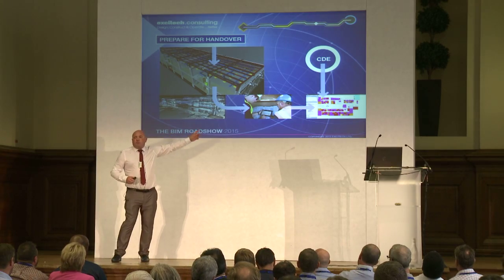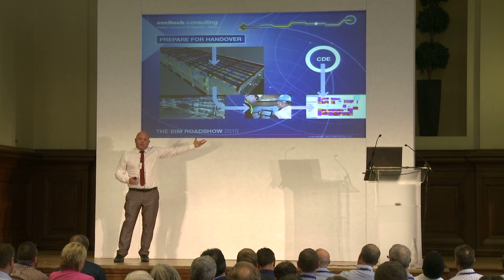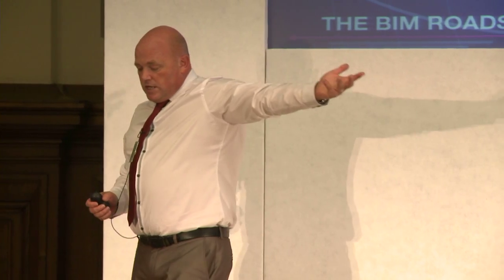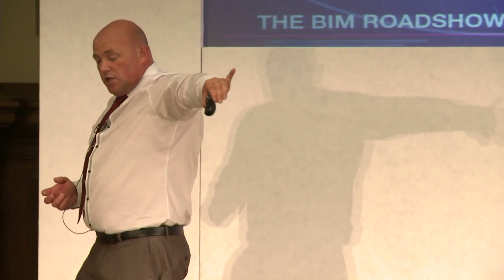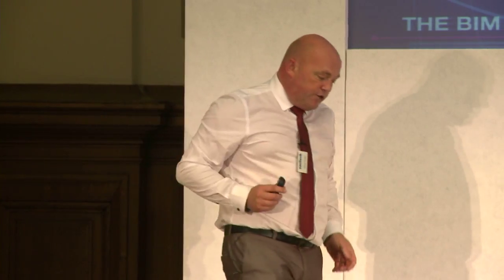But I've collated the majority of the information in a field system. Now, the field system is a SQL database. And luckily for me, the FX360 system is also a SQL database. So what I need to do is look at merging the 2 fields within the different databases to migrate that information over now.